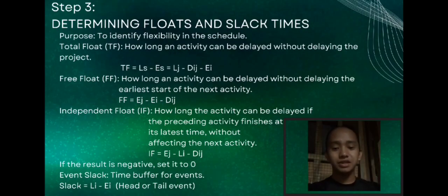So good day everyone. In continuation of the discussion, let's break down these project management ideas in a simple way. Imagine you're planning a big event like a fiesta here in Bukidnon. Total float: think of it as how much you can delay a specific task without pushing back the entire fiesta date. For example, maybe you can send out invitations a few days later than planned, and it won't affect the actual day of the fiesta. So the formula helps you calculate exactly how many days of wiggle room you have.